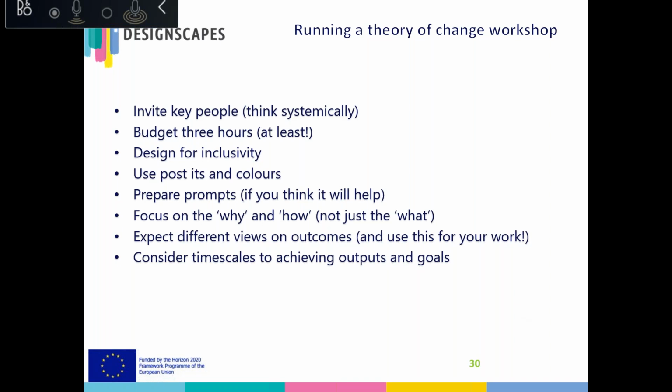So you might identify a core group of people that are absolutely central, and there's nothing stopping you from then sharing the theory of change more widely with a slightly more peripheral group. Do budget the time. There are some theory of change workshops that can go on for 2-3 days, which might be a bit much, but definitely budget at least 3 hours or half a day, because, as you might be very familiar with, going through that process generates a lot of discussion, but it's worth putting in the time.